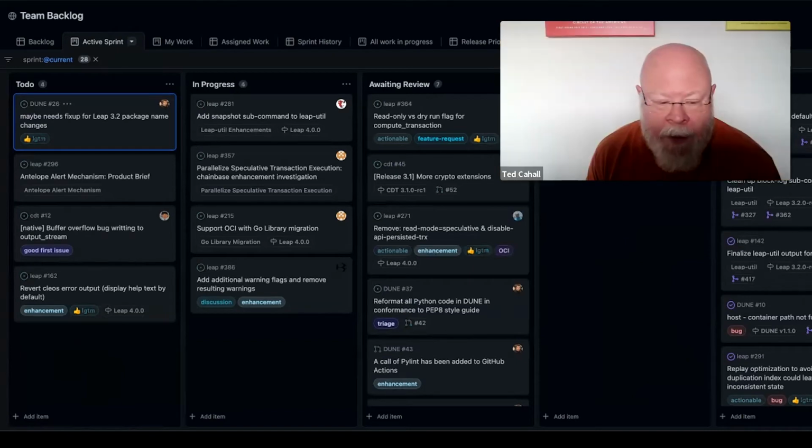Right. And the other thing is, coming from Jeff's side of the house, we need to do longer range planning. So we plan on generally having a March, April release and an August, September release each year. And so getting the things that are going to be in that March, April release requires us to do a little bit of long range planning. Will this item fit in that release or not? And we have to get those features prioritized into the release first.